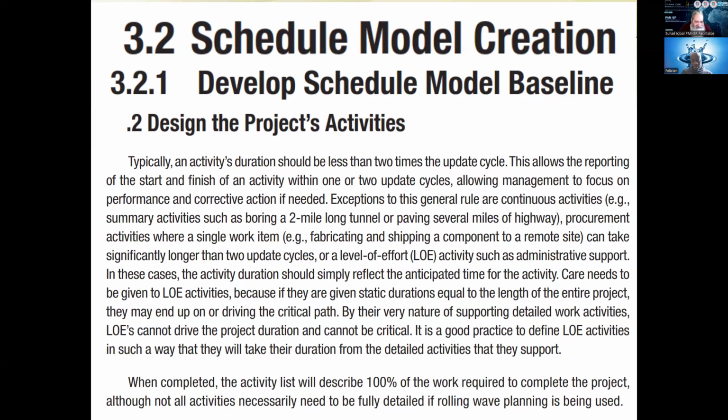For example, you are constructing a house, and many activities are there. They are just kind of within the update cycle or whatever. But there is an activity of supervision of that wall, and that wall is going to take 6 weeks. So for 6 weeks, the job of supervision will continue. Such activities are called continuous activities.